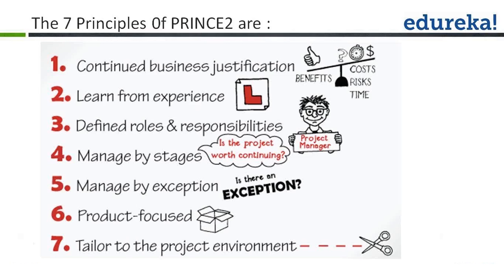However, if the project manager forecasts that actuals might exceed the allowable tolerance, then this is known as an exception. In PRINCE2, this must be escalated to the senior management for a decision. This, therefore, is a very efficient use of senior management time and means that the project board is only involved in taking decisions as and when the need arises.